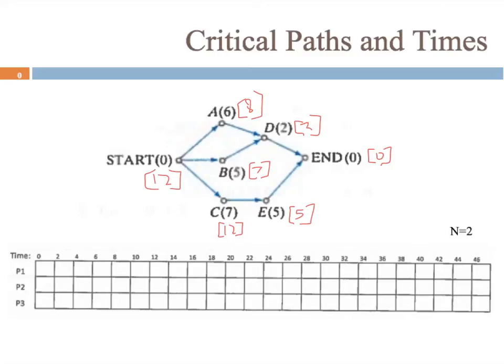The largest critical time looks like it's task C, so that's going to take priority. And to be clear, we're not going to put in the critical time in the list. We're still using the processing time, so that's task C, which takes 7 hours. The task with the next highest critical time is task A, with critical time 8. But again, we're still using the processing time to make our schedule, because that's the actual amount of time it takes to do the task. Well, sorry, that's kind of sloppy. That says A, and it's 6 hours.